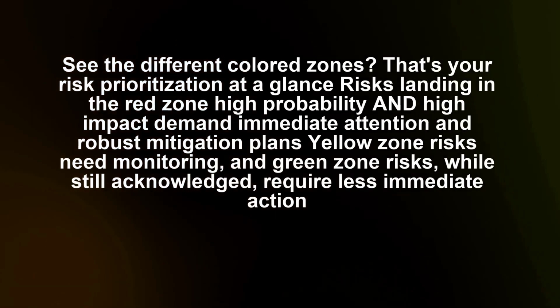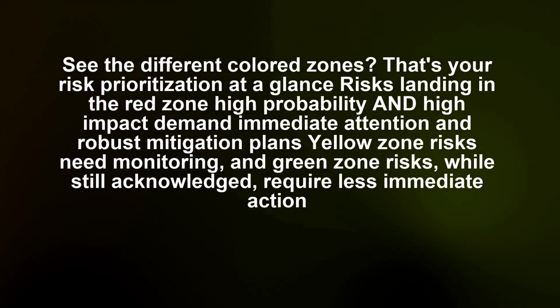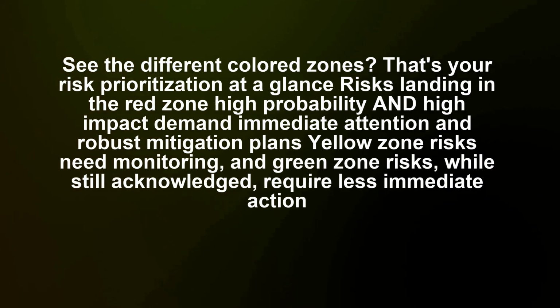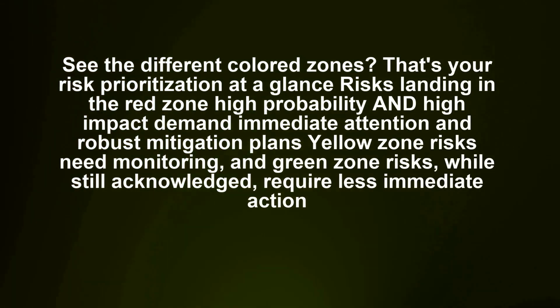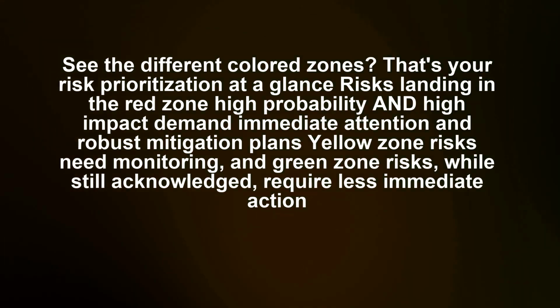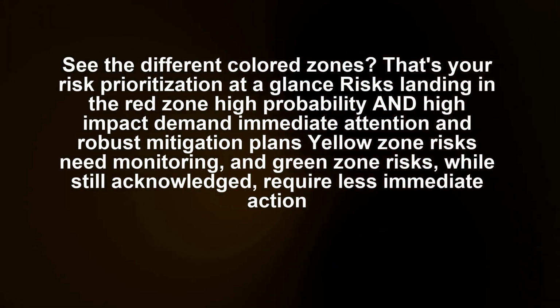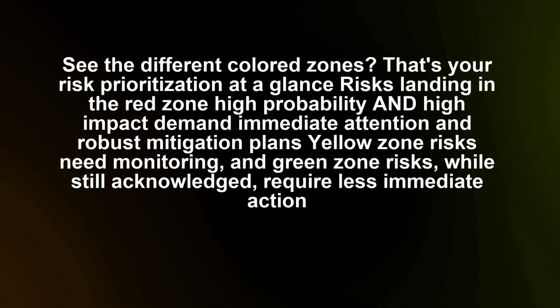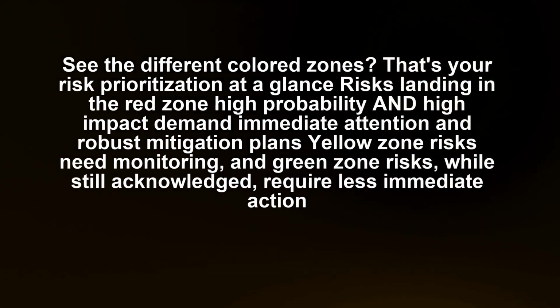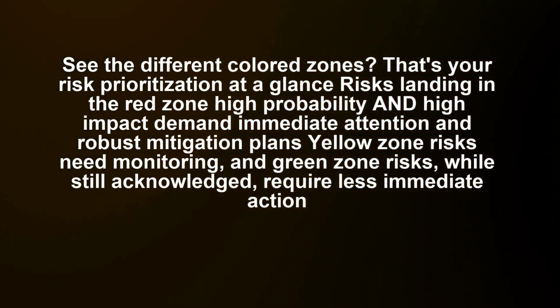See the different colored zones? That's your risk prioritization. At a glance, risks landing in the red zone, high probability and high impact, demand immediate attention and robust mitigation plans. Yellow zone risks need monitoring, and green zone risks, while still acknowledged, require less immediate action.